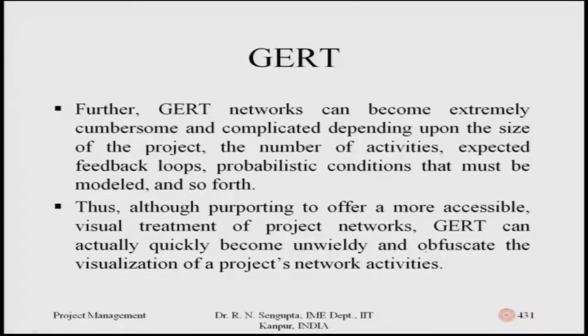So, it says that GERT networks can become extremely cumbersome and complicated depending upon the size of the project, the number of activities expected, the feedback loops, the probabilistic conditions that must be modeled, and so on. Thus, although purporting to offer a more accessible visual treatment of project networks, GERT actually quickly becomes unwieldy and very difficult to draw, and obfuscates the visualization of the project's network activities. In the overall scheme of things, if somebody is considering the overall macro project, trying to go into the details at the micro level becomes very complicated many times.